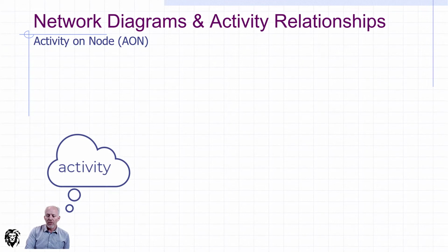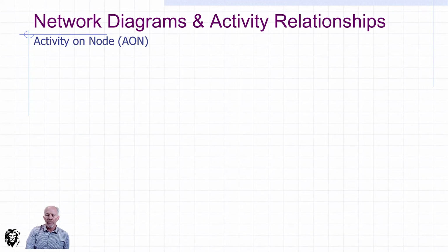Now, I believe that you don't want to do these on a Gantt chart type interface, because I have found I am very susceptible to imposing my scheduling bias, how I am predisposed to schedule the project, in establishing my precedents when I'm doing them graphically. Whereas if I do them logically, say on a spreadsheet, working off my work breakdown structure, I ask, okay, what activity has to be done before this? Okay, I need to paint the walls. Oh, I need a wall. Do I need a floor? Well, maybe not. Depends on what floor you're on. So we can break it down to the actual logical causal dependencies.